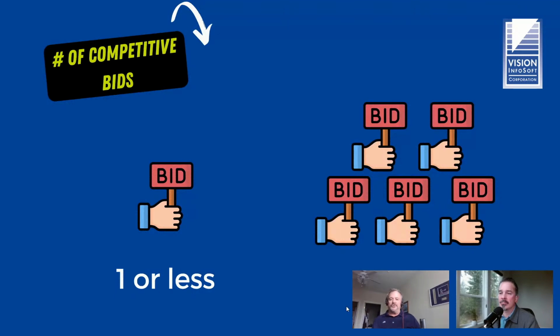So one of the first things to get some kind of a read on is the number of competitors you have that you're bidding against. A lot of the time you won't know. I understand that. Sometimes you're not bidding against anybody, or maybe just one other company. My rule of thumb, quite frankly, and I know people will disagree with me on this, is that anytime you're bidding against five or more other electrical contractors, it very well may not be worth your time.